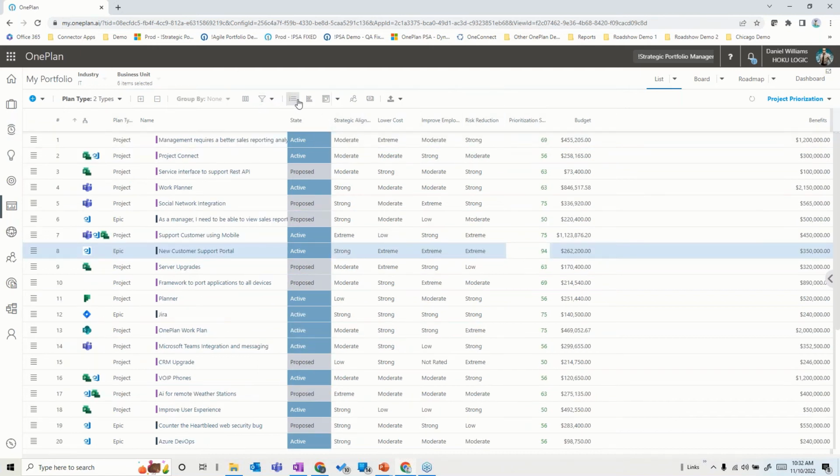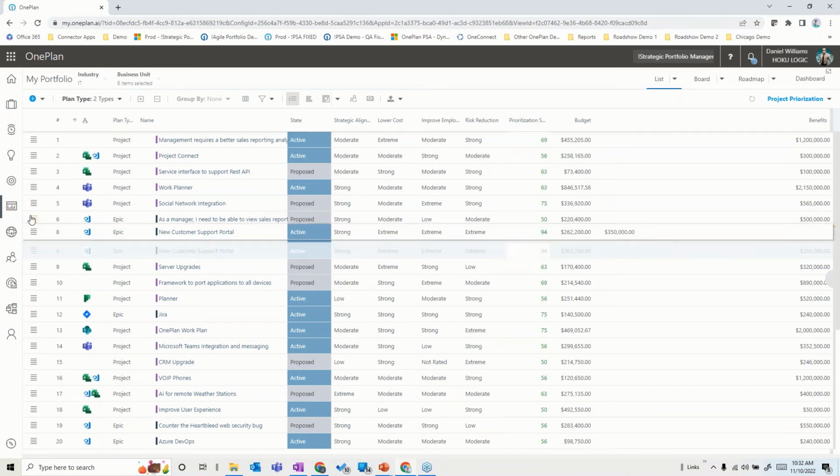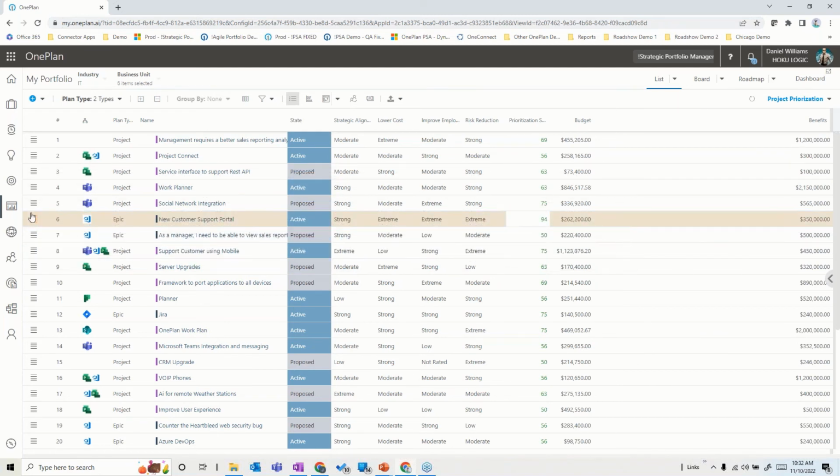For example, you can have a forced ranking that, if you notice, is not in prioritization score order, where someone can decide, by either regulatory or whatever prerogative by leadership, that you want to raise things up in the prioritization order. You can do that and come up with an actual forced rank over here on the right that helps us put something together that factors in things that are out of our control or things that are mandatory, rather than whether or not it's just value based. So a lot of flexibility in the way that you would structure those.